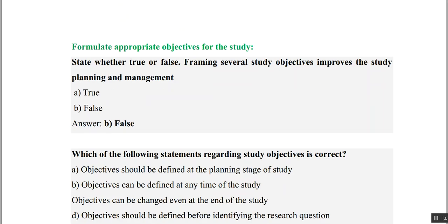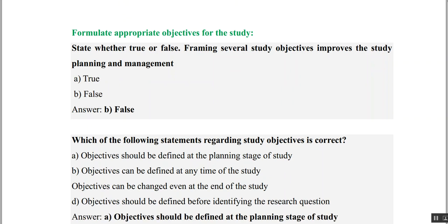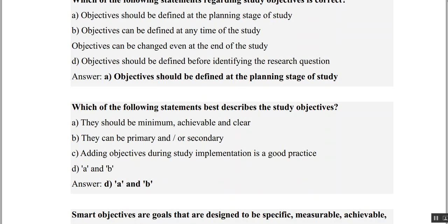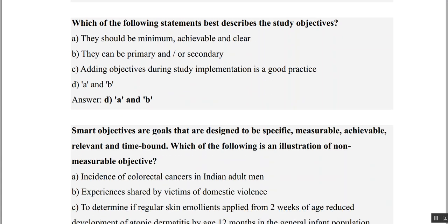State whether true or false: framing several study objectives improves study planning and management — No, objectives should be very few, so this is false. Which statement regarding study objectives is correct? Objectives should be defined at the planning stage — yes, that is true. Not at anytime, not at the end, and not before research questions — so the answer is 'objective should be defined at the planning stage.' Study objectives should be minimum, achievable, clear, and can be primary or secondary — A and B are correct. Adding objectives during study implementation is a bad practice.